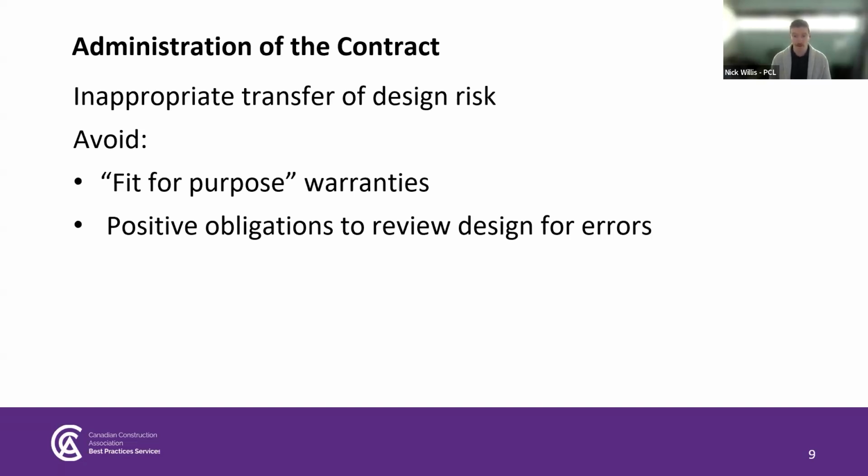Second, terms that impose a duty on contractors to review design documents and warn the owner of errors. These terms can lead to potential insurance coverage issues, and they can also cause contractors to incur additional costs related to reviewing the owner's design. So these obligations, if they exist at all, should be limited to requiring contractors to warn owners about errors that they actually discovered during the course of the work. Contractors should not be held liable for what they should have noticed when they're not responsible for design.